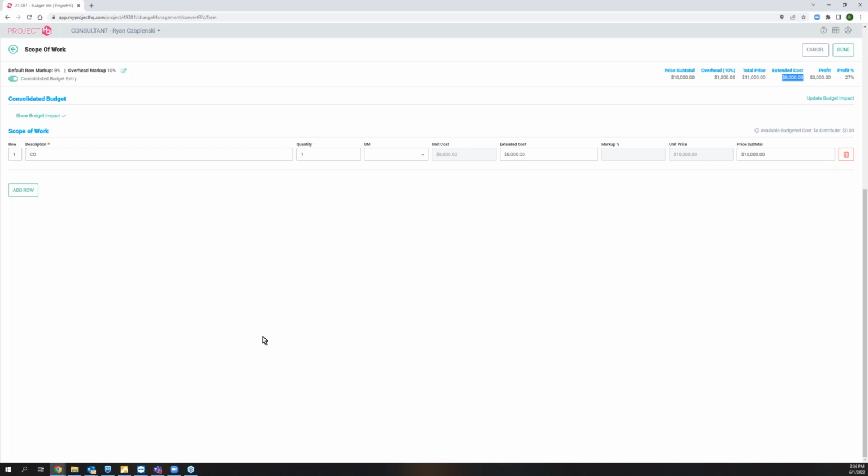So I guess I don't disagree with you. It's kind of double entry, but it's not at the same time. In one place, we're putting in the total change to our estimated cost, and in the other place, we're breaking that down into the cost code. So in my case, one cost code had all of that cost, but it could be broken down to different ones.